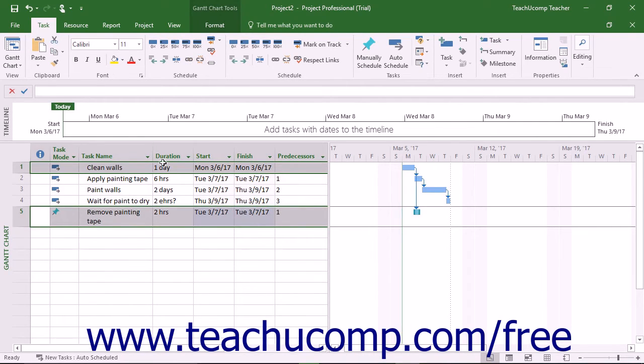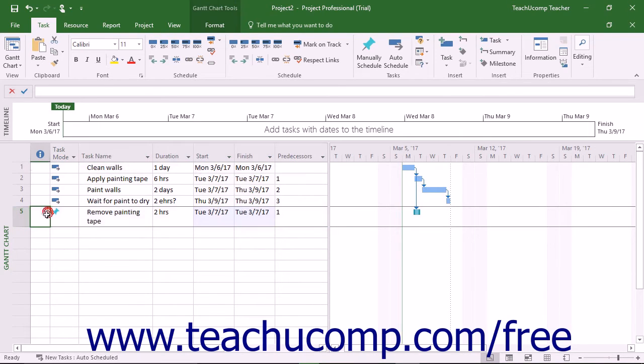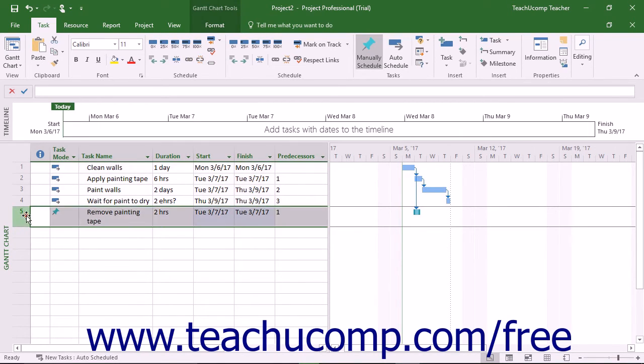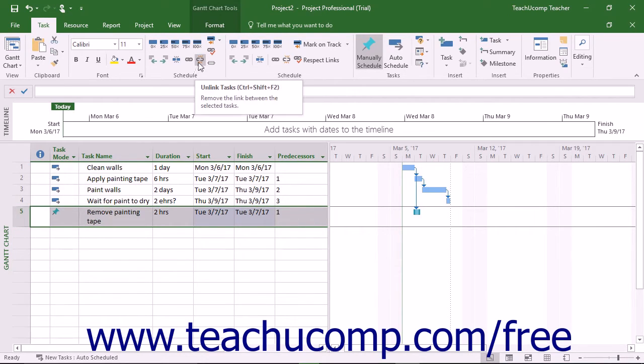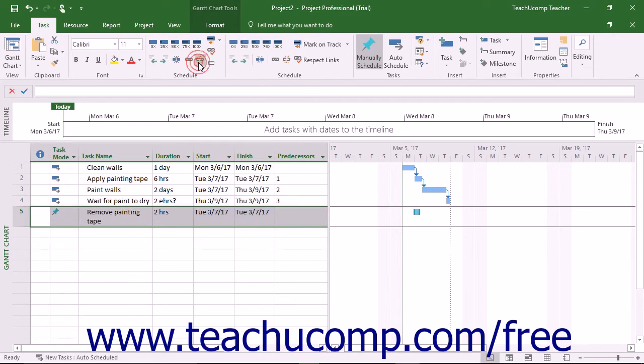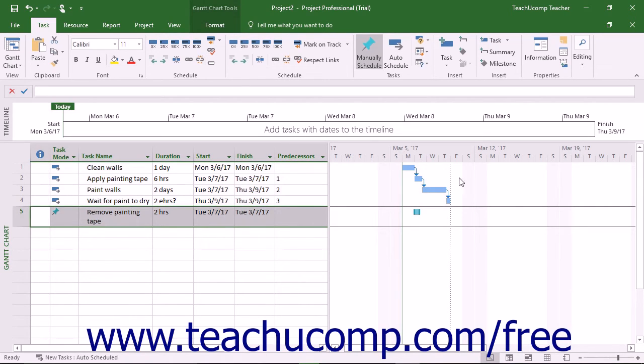To unlink selected tasks from a task chain, first select the task or tasks to unlink. Then click the Unlink Tasks button that appears in the Schedule button group on the Task tab of the ribbon. If you unlink one task from a sequence of tasks, Microsoft Project redraws the linking lines shown between the remaining tasks in the task chain of the Gantt chart view.